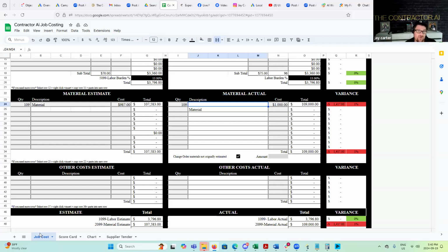So if you can pay sooner, you want to leverage that. What's the difference of 1 or 2% on a job? You're catching them on the supply. I'm a fast payer. That gives me some power, some ability. The next thing is being able to look ahead. Let's say you get a month, 2 months, 3 months in backlog. You take your material lists, the things you need to order, you figure out your pricing and you negotiate.